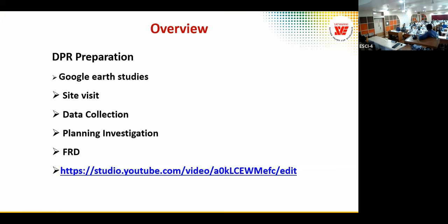So next is data collection. Data collection about the population there and what risks there can be to the site. In one of the sites, we had a labor camp. For example, we planned for this risk, but still we could not avert it. There were 200 people working in the project, and suddenly one night there was a stabbing incident, and the whole labor camp got evacuated.